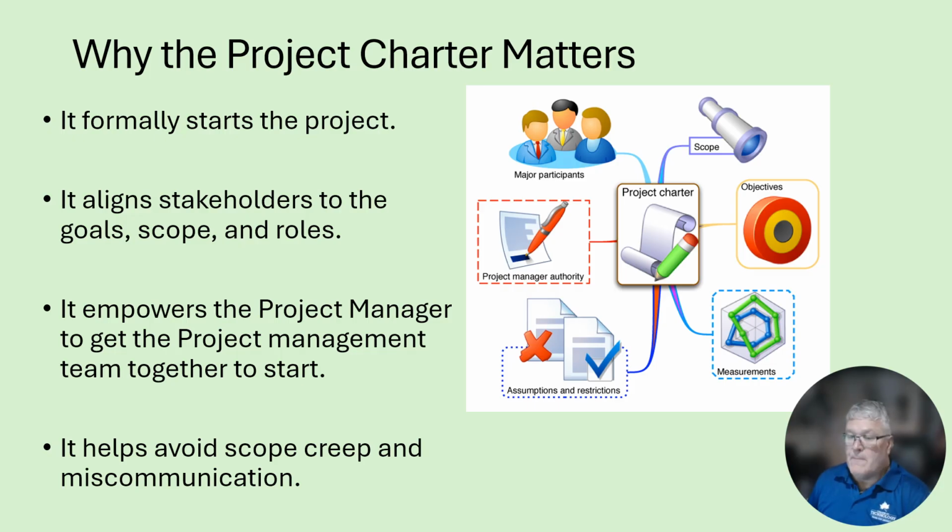Why the project charter matters? Well, it formally starts the project. It also aligns stakeholders to the goals, scope, and roles attached to the project. It empowers the project manager to get the project management team together to start the project. It helps avoid scope creep and miscommunication. And actually, once the project charter is done, the project manager needs to have minutes taken in that meeting, and then disperse those meeting minutes to everyone involved so they're up to date and they feel as though they are involved.